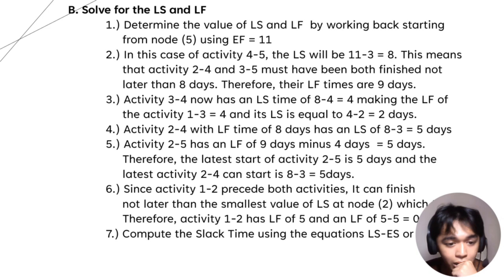Number 6, since activity 1 to 2 precedes both activities, it can finish not later than the smallest value of LS at the node, which is 5.